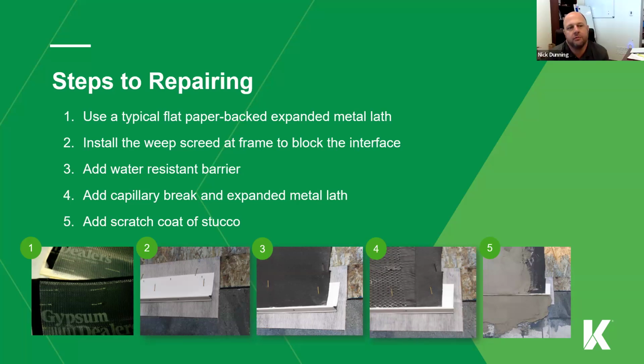Yeah, it's ridiculous to see contractors that have never worked with an engineer. And the first time we say, no, you're doing it wrong, they say, well, I've been doing this for 20 years. Well, then you've been doing it wrong for 20 years. We look for pay apps and payment certifications. Well, you didn't replace 300 cubic feet of concrete. You only did 3. Why are you charging for 300? Why are you saying that you replaced 20 windows when you barely touched 1? So those kinds of things, you have to have someone on your side to do that.